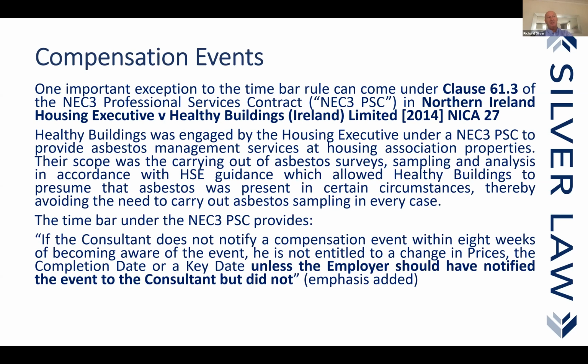The information was finally issued 7 days late, upon which we were then able to return with the rig and to carry out the works. This ultimately caused a delay of 2 weeks, being from January the 1st to January the 15th, and caused a consequential similar delay to completion. There's your extension of time notice, and then your loss and expense should refer back to your extension of time and set down what is the impact upon resources.